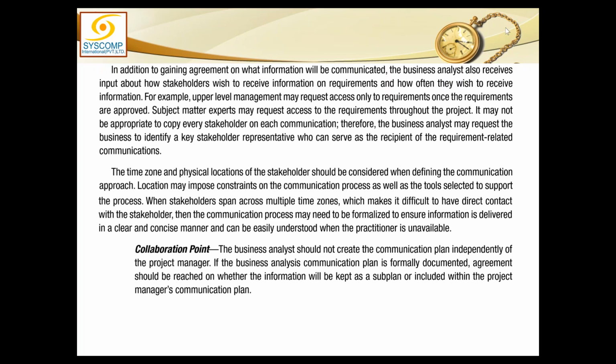In addition to gaining agreement on what information will be communicated, the business analyst also receives input about how stakeholders wish to receive information on requirements and how often they wish to receive it. For example, upper level management may request access only to requirements once the requirements are approved. Subject matter experts may request access to the requirements throughout the project.